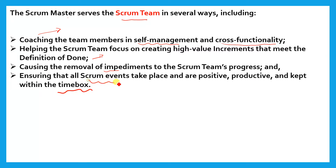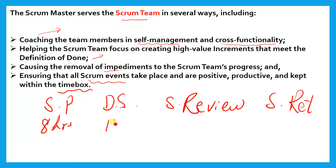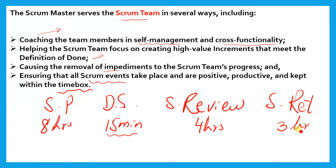Ensuring that all Scrum events take place and are positive, productive, and kept within the time box. There are four formal events: the first is sprint planning, then the daily Scrum, third is the sprint review, and fourth is the sprint retrospective. These are compulsory formal events. Each event has a time box. Sprint planning has a maximum of eight hours if the sprint is one month. Daily Scrum is 15 minutes. Sprint review is four hours for a one-month sprint. Sprint retrospective is three hours for a one-month sprint.